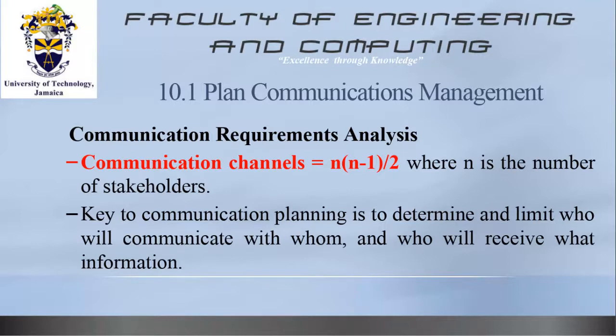We need to be very conversant with this formula. In determining the amount of communication channels on a project, the formula is n(n-1)/2, a half n times n minus one. So please remember this formula because you will definitely be seeing it in tests, etc. What this formula does for you is determine the number of stakeholders and that are open in a communications channel.